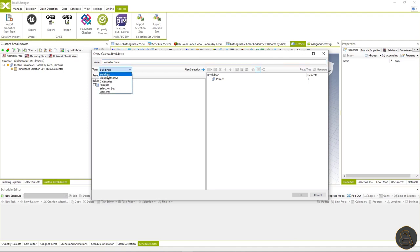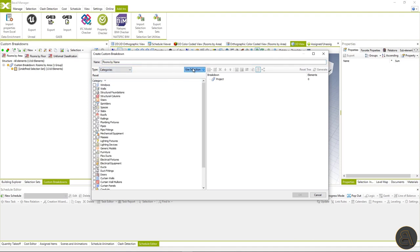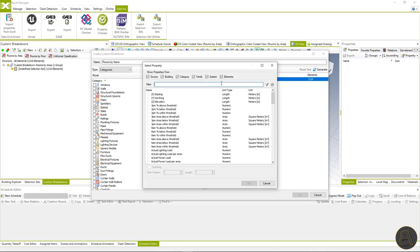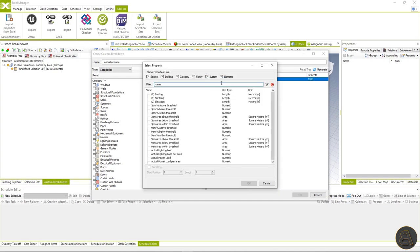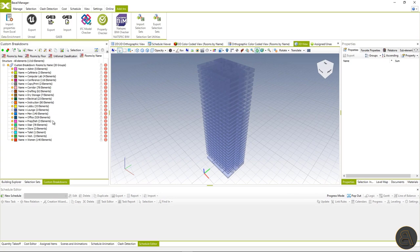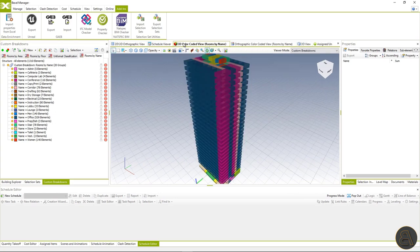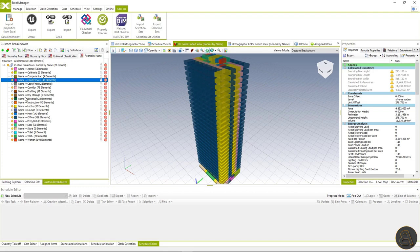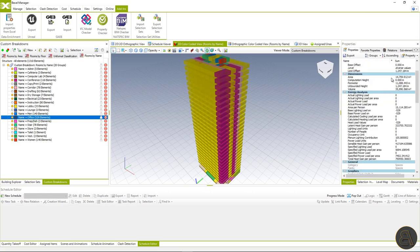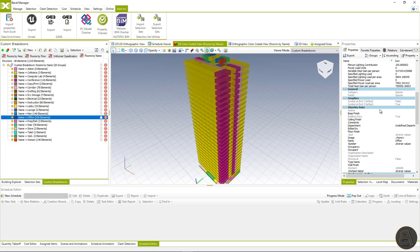We will create a new custom breakdown, name it, select elements for the breakdown structure — in this case, spaces, which is basically the rooms category from Revit — and choose a property as the rule for breakdown. We will filter and choose room name from the elements' property list, set the color-coding rule, and generate the structure. We can now see a list of rooms contained in the project. We practically have a visualization of the project's rooms and spatial analysis in a matter of seconds. For this kind of analysis, you will need to name rooms within the authoring tool, but it's already a standardized procedure and basically every model has this information in early stages.